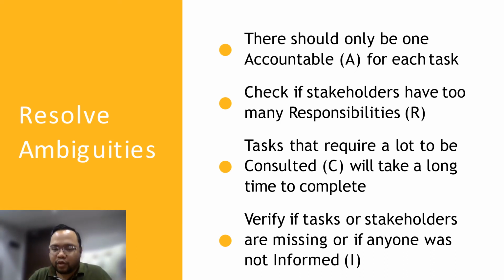Now, we also see if the stakeholders have too many responsibilities. Why would this be important? Because we will be able to see if the load is balanced, or if a certain group of people or a certain person is having too much responsibility just actually doing the work.